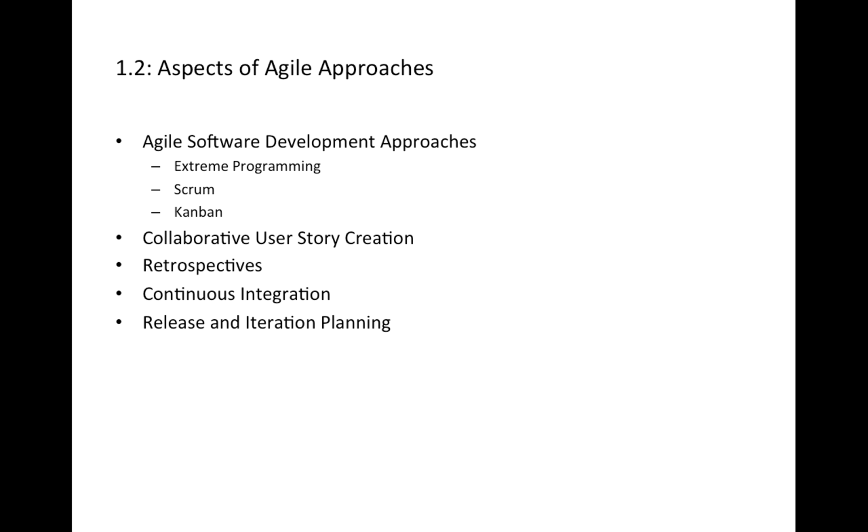Let's say the last bit, which is release and iteration planning. Testers are involved in release planning and add value especially in the following activities: definition of testable user stories, including acceptance criteria, which is part of the release planning. The others are participating in project and quality risk analysis, estimating testing efforts associated with the user stories, defining the necessary test levels, and planning the testing for the release. So these are a few of the activities involved.